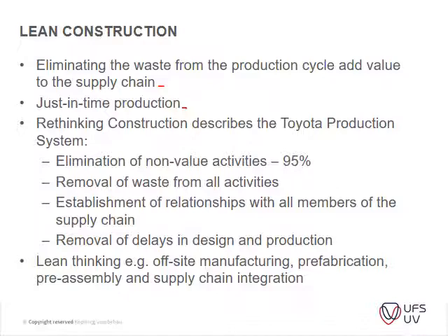It's delivered usually a day or two before it's actually installed, and thus you do not have to have a big site to store all the material. You also do not have to pay for storage containers and so on for prolonged periods.